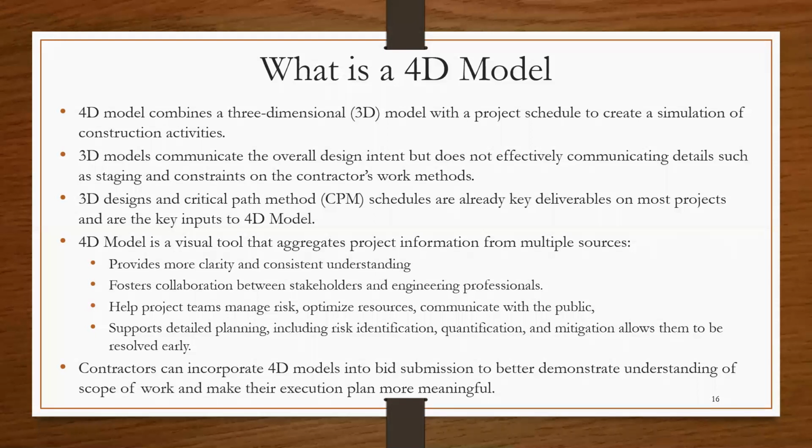Contractors can incorporate 4D models into their bid submissions to better demonstrate understanding of the scope of work and make their execution plans more meaningful. Like all of you know, especially the contractors among us, the whole essence of technical evaluation is for you to demonstrate an understanding of the scope and help your clients understand that you understand what you need to do and how to do it. If you're able to communicate that, you are basically sure to pass your technical evaluation. And the 4D model is a critical tool that will help you do this.